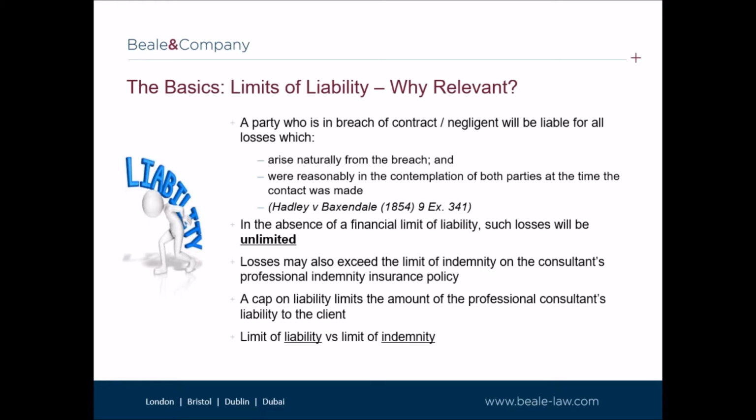Thank you, Will. Beginning with the basics, we often use phrases such as unlimited liability, cap on liability, and limits of liability. A reminder of their relevance is useful for what follows next in this webinar. A long-established principle following the decision in Hadley v. Baxendale is that if a party is in breach of contract, the defaulting party will be liable for all losses which fall under two limbs. Firstly, losses arising naturally from the breach, and secondly, losses which are reasonably in the contemplation of both parties at the time the contract was made.